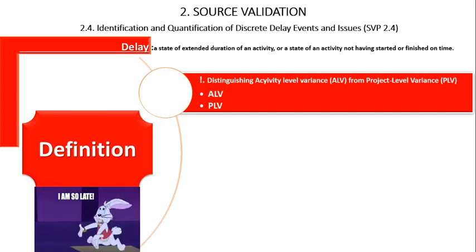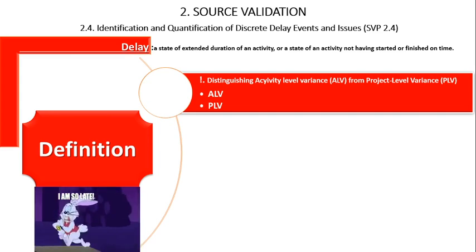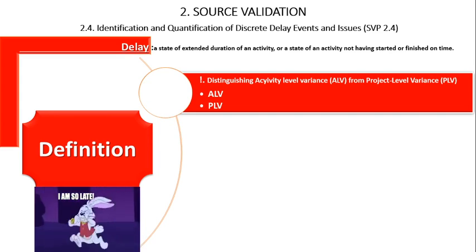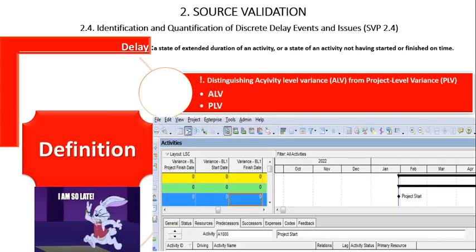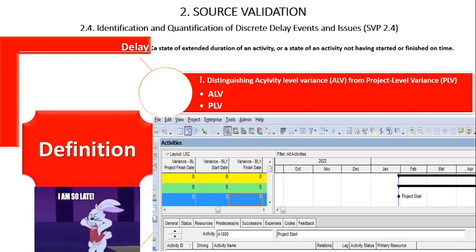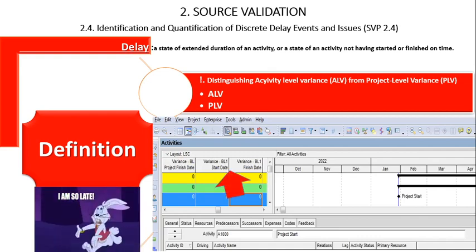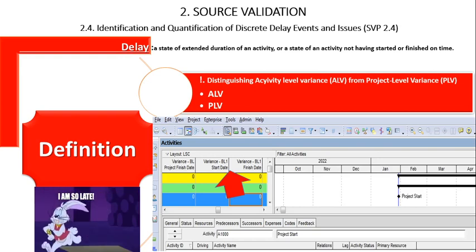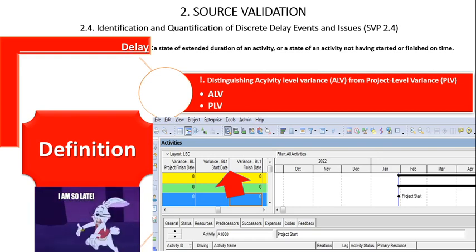The first point is distinguishing activity-level variance from project-level variance. Activity-level variance: forensic delay analysis primarily focuses on determining start or duration variances of a specific schedule activity, otherwise known as activity-level variances. Activity-level variances are the result of several types of delay causes.